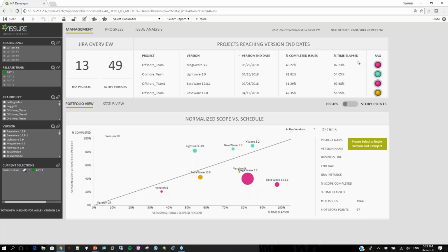Or another thing is they could actually have bumped into a quality problem, and the quality problem has suddenly created a lot of new bugs, and suddenly our backlog has so many new bugs that our scope has grown quite a lot, and for this reason we've only completed 40% of the issues in such a long time.